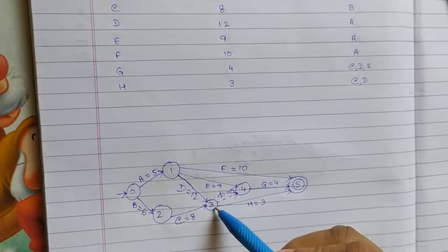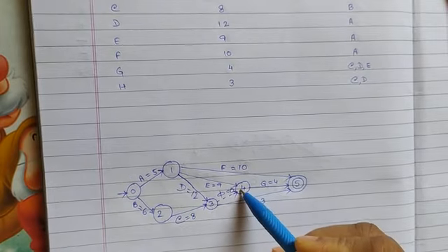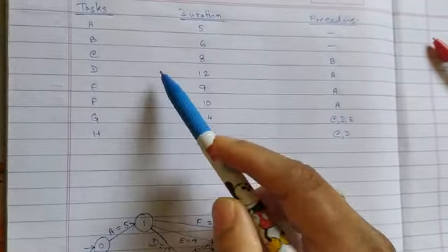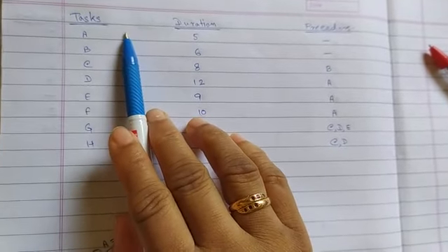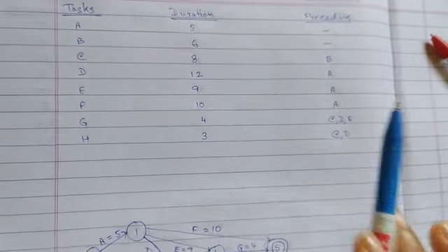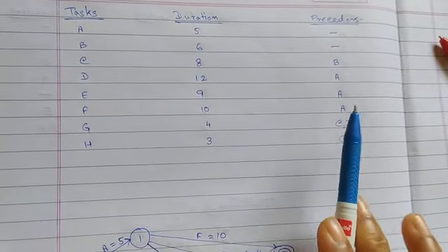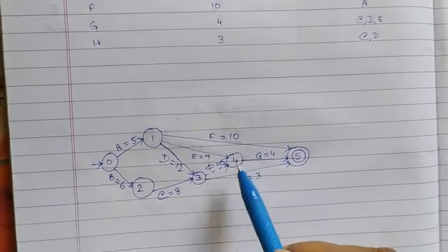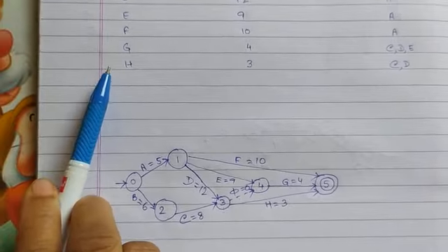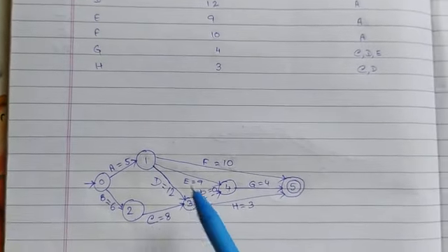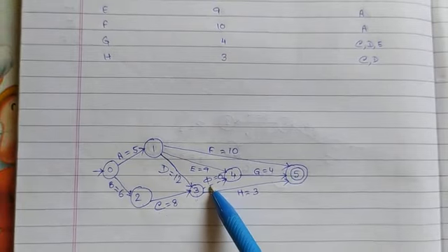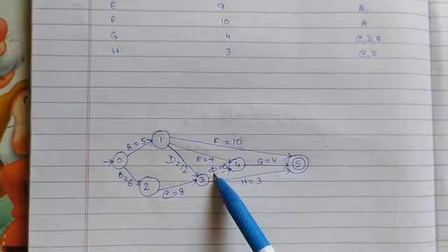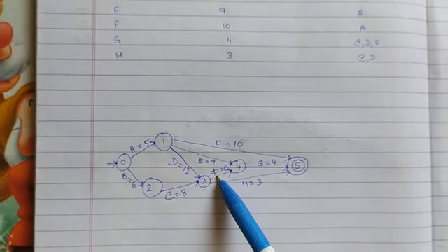So we will have to join state 3 and 4 with a task. Now we cannot add any new task over the tasks that are already created for the development of the project. So this task which will join 3 and 4, but is not mentioned in the process or sub-processes of the entire system, will be denoted as phi task, whose duration is 0 unit. Okay, and this phi task is known as null task.